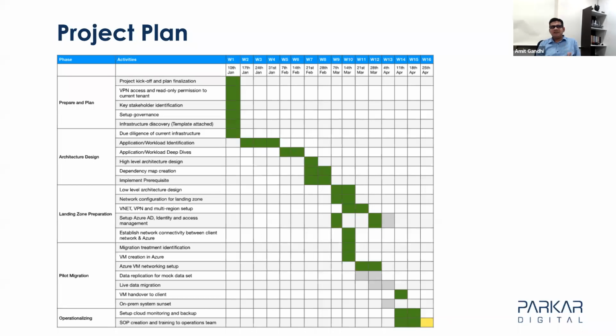During the architecture design phase, we also invited our friends over at Microsoft to go over the high level design and brainstorm over it together with the customer. Creating the landing zone took about 2 to 3 weeks, primarily due to the dependencies upon the customer IT team and policies. But the end result was great, where the workloads could be moved immediately.